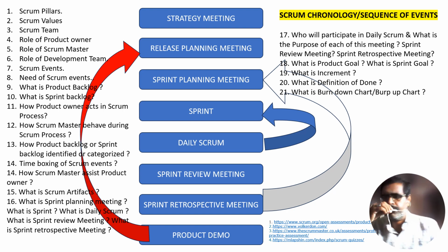That is, it is to plan ways to increase the quality and effectiveness, right. That is important. The Scrum team identifies the most helpful changes to improve its effectiveness. The most impactful improvements are addressed as soon as possible. They may even be added to the sprint backlog for the next sprint. The sprint retrospective concludes the sprint. It is time-boxed to a maximum of 3 hours for a 1 month sprint. For a shorter sprint, the event is usually shorter.